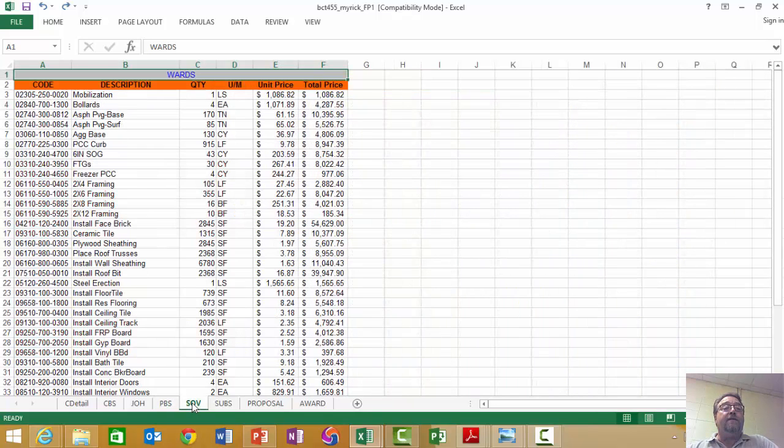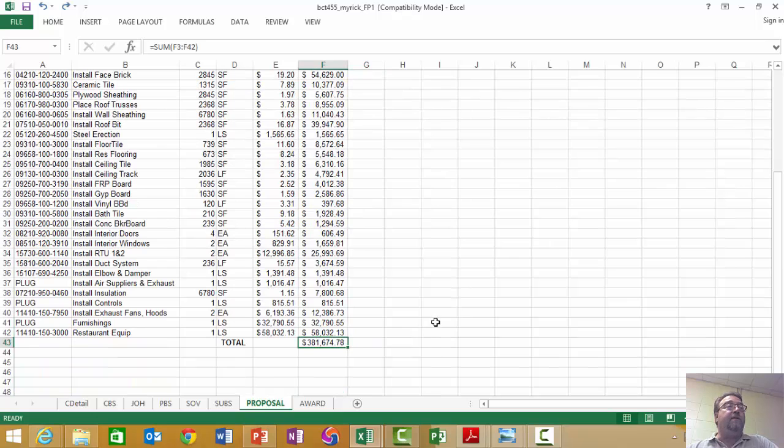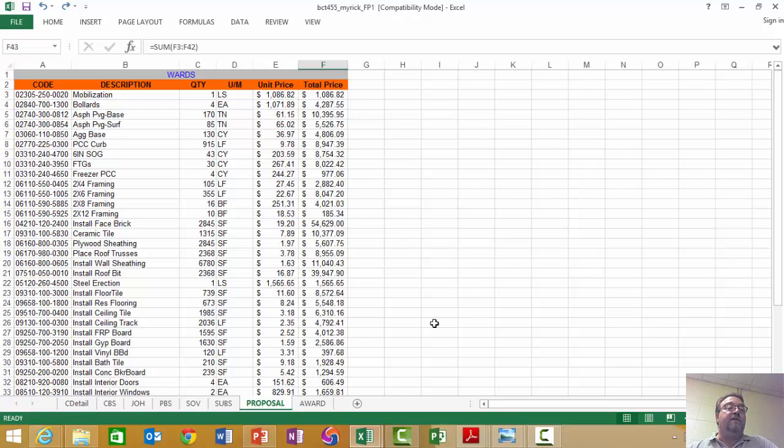And then I have a schedule of values here, or I don't know what the difference between that and the proposal is. The proposal can just be, boom, one number. That could be your proposal. But see how it's using the same items. They morph from cost items to pay items to, I guess, tracking items in the project controls.